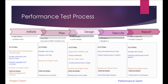The performance test process is divided into many phases: initiation phase, planning phase, designing phase, execution phase, and reporting phase. As you can see on the screen, the activities and deliverables highlighted in orange color in each phase are to be taken care of by the project team. The activities and deliverables in blue are the responsibilities of the performance testing team. I suggest pausing the video for a minute or two to understand each team's deliverables and roles.